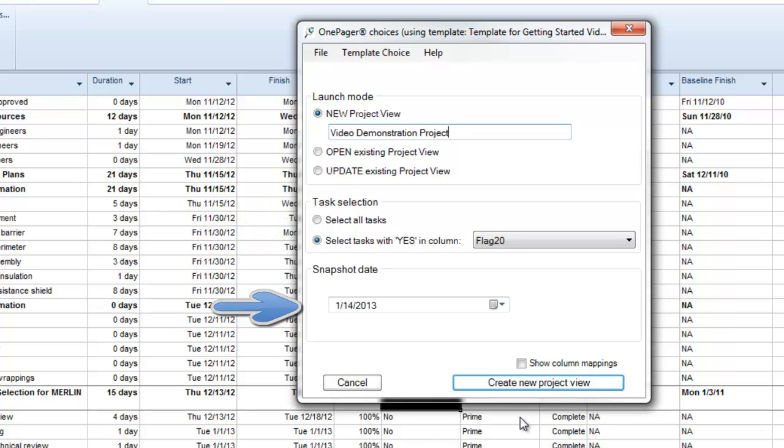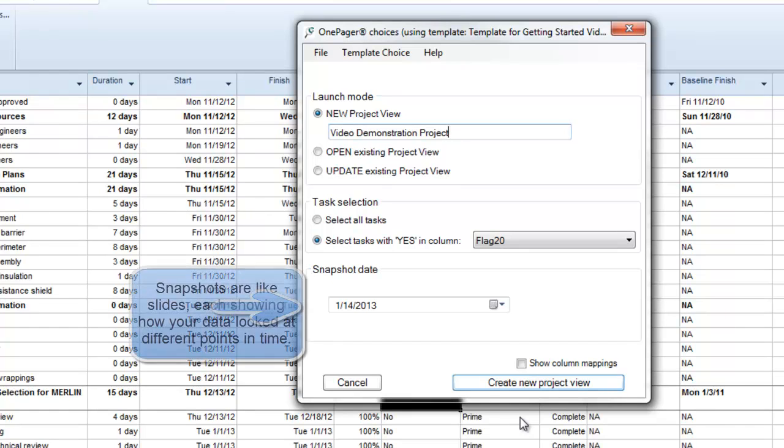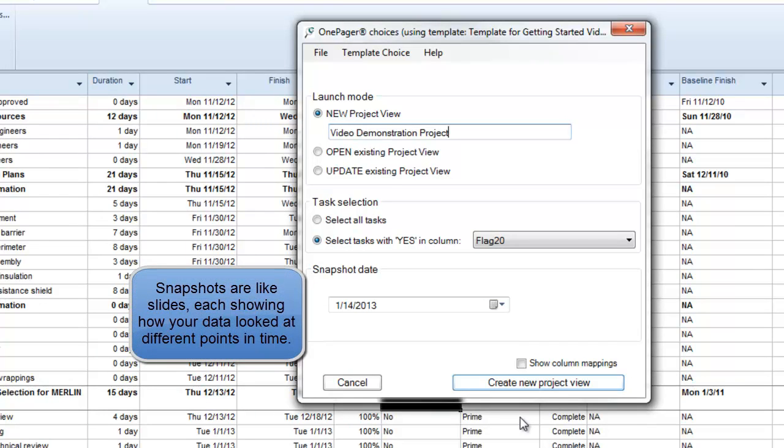The snapshot date is meant to represent to the audience the date to which the initial view being created is accurate. You can have as many snapshots within your one-pager document as you need, representing how your data looks at different points in time. But since we're creating a brand new view, this will be our initial snapshot.